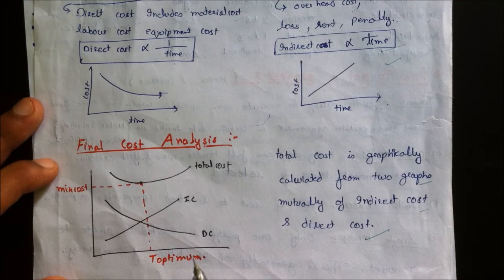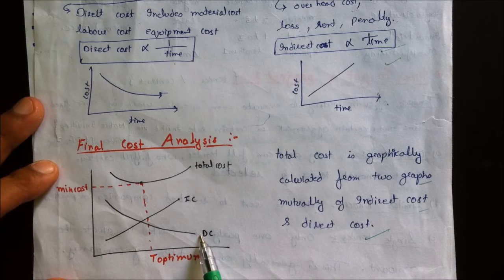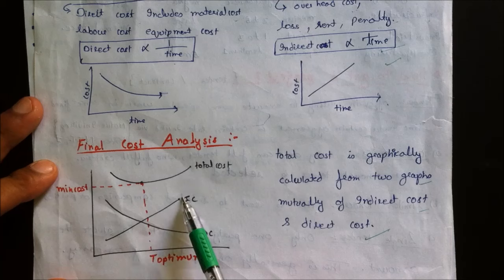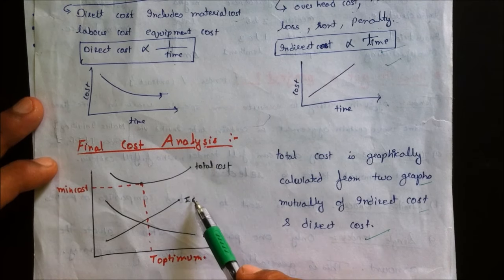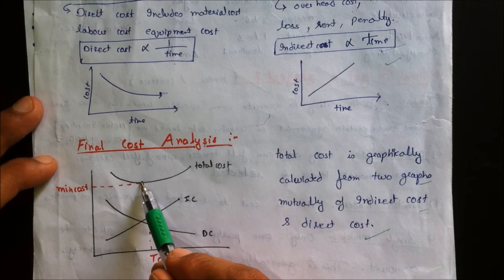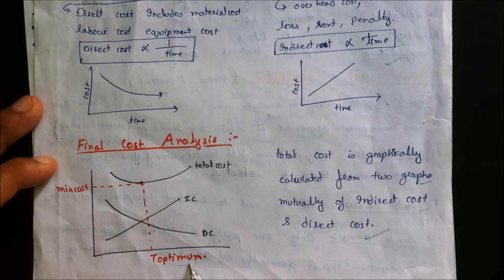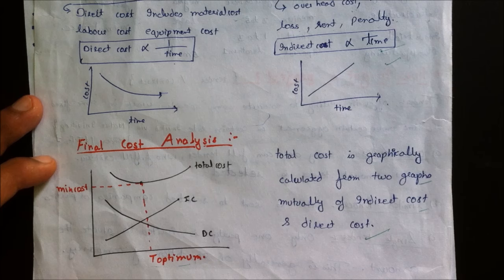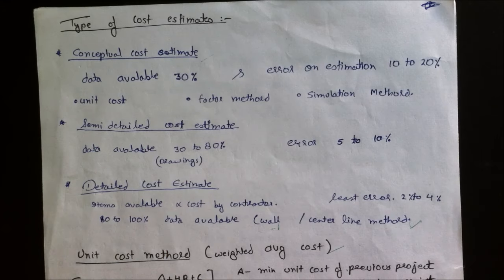Since direct cost decreases with time and indirect cost increases with time, we plot an optimum curve which is the summation of both. The least value on this combined curve gives the minimum total cost and the optimum time to complete the project. This total cost is graphically calculated from the two curves.